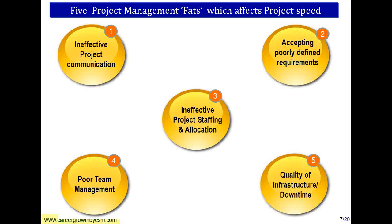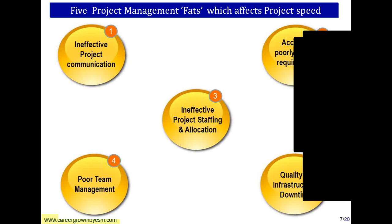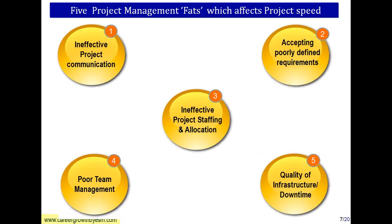The third factor is ineffective project staffing and allocation. Many times when someone asks for more resources, the resource manager goes to another team. In most cases, the other project manager won't release their best resources — they release the ones they don't want, which results in wasteful resource allocation.